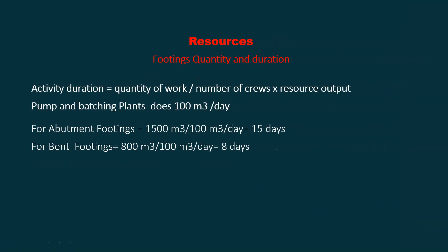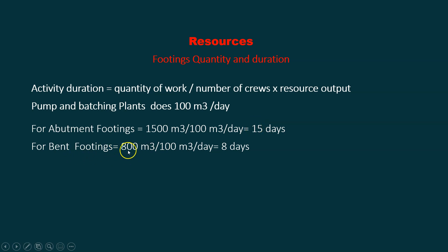For the footing, if you have a pump and batching plant that can produce 100 cubic meters of concrete a day, and your abutment footing is 1500 cubic meters divided by 100 — the productivity — it will give you 15 days. For the bent, 800 cubic meters divided by 100 gives me 8 days.